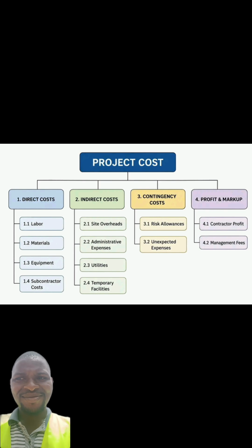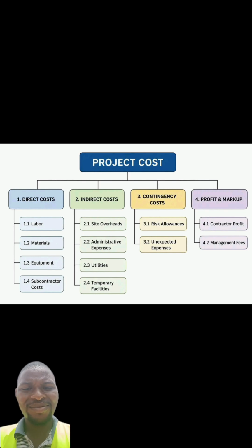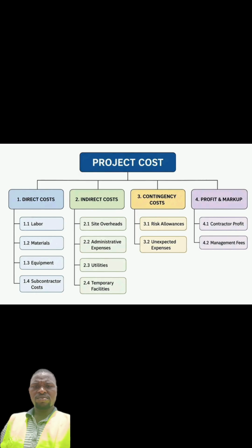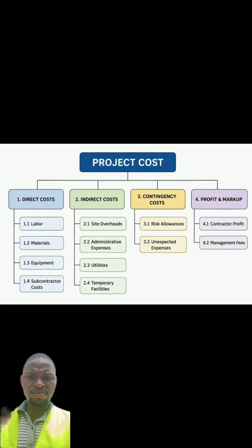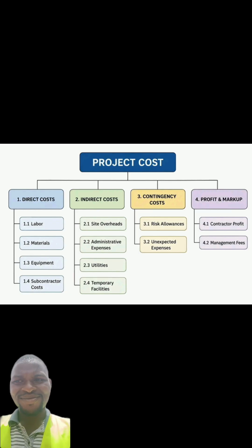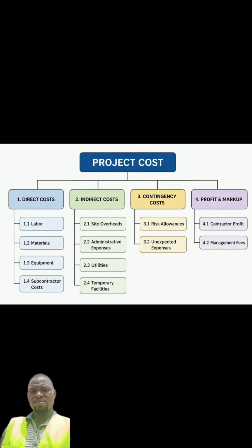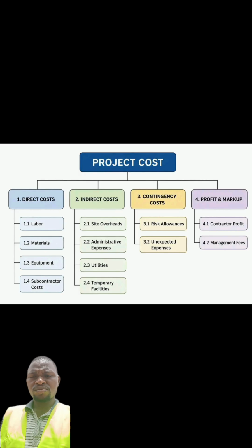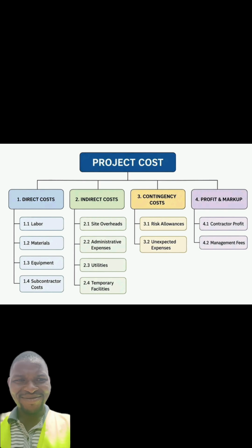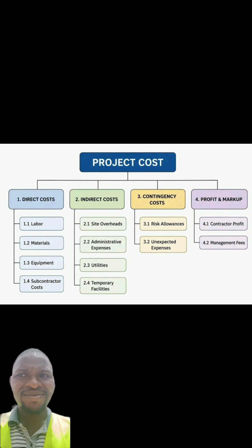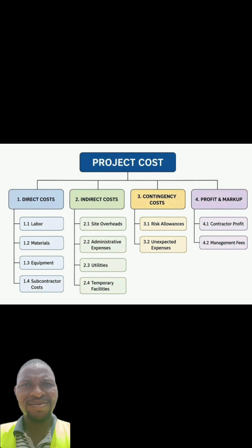Then the other point we have is equipment. Materials are important, then your equipment too is also important, because it's those equipments that are going to ensure the utilization of the material. Like your concrete mixer, if your concrete mixer is not available on site, and you have a large surface area to cast, it becomes unproductive for you to start using manual labor, because you're going to tend to use more cash, right? At the end of the day, you tend to spend more.